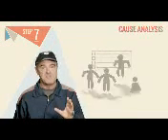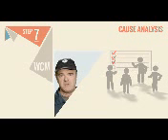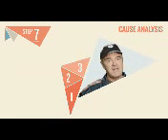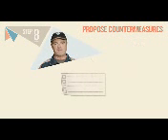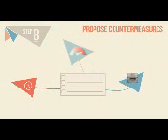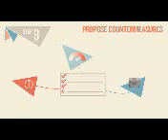The next step is to identify the root cause or causes. Use the WCM tools, typically the 4 M's and the 5 Y's, to get to the bottom of the problem. Once you've done this, you can start to identify relevant countermeasures. The countermeasure ladder will help you evaluate how reliable your proposed solutions are. In step 8, the Kaizen team decides which countermeasures will be the most impactful, with an eye on cost reduction, time, and how difficult they are to implement. In other words, they do a cost-benefit analysis on each countermeasure.